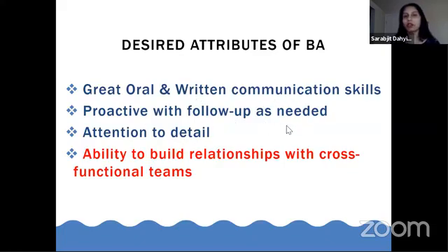You need to be proactive with follow-up as needed. Oftentimes in requirements gathering sessions, business stakeholders will say, I'm not 100% sure on this, I need to follow up with somebody and get back to you. And oftentimes they have their own full-time jobs and responsibilities and they forget. So you need to be proactive with follow-up to go back to that stakeholder and say, hey, we talked about this and we didn't close the loop. Can we go back and talk about this? That's where proactive follow-up is needed. Probably at least 10% of your time, if not more. You always have to be proactive and make sure you're closing the loops as needed.